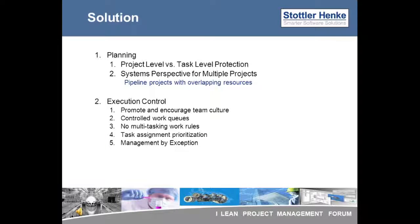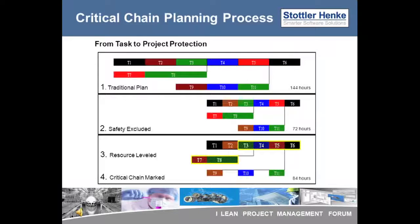Here we will examine how the aggregation of risk principle actually plays out in the critical chain planning process. We start with a traditional critical path plan. In these diagrams, each color represents a different skill category and there is quantity one of each skill category. The first step in the process is to exclude the built-in safety of all the task estimates. A simple rule of thumb is to cut the current task durations in half.